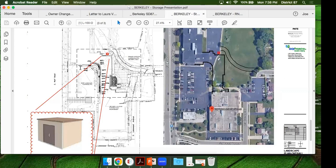Oh, yeah, I mean, did the 330 include everything, the electricity, outlets? Yeah, the 330 to 360 was our best estimate of all-in completion. So it is your power supply, heaters, basically a finished maintenance garage envelope. And the other two options also have an estimated component, but we also have the hard costs of those prefab sheds. So we're pretty confident that 55 to 60,000, depending on which site we're at, is a good number. At Riley North Lake we're in for about 55,000. At this campus, the range would be either 350-ish for the extended bay, or for a standalone shed we'd be closer to 60,000. So the swing could be in the neighborhood of 300,000 at this campus.